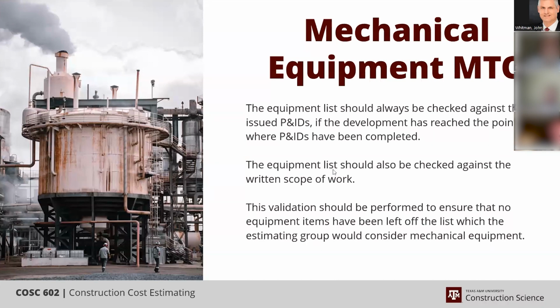Truth is that if it's a small enough project, you can do that. If it's a large enough project, it becomes just too expensive to pay somebody to spend the time. You just have to trust engineering, because I've worked on jobs that were just 10-20 million dollars, and we only had 10 PNIDs, and it was doable. I could do it, and also I cared about it, so I did it.